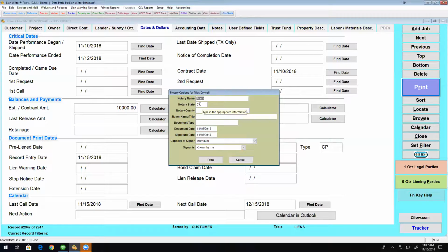It depends if you need a notary on a mechanics lien on the county in the state of California. There are counties, if you send along a notarized release, they will send you a nasty note back with your notary on it, and it will say that, okay, we filed it, but we don't need a notary. You send it to another county, and they'll send you your mechanics lien back saying, oh, you didn't send the notary, you're in trouble. Find out if the county you're filing in is requiring a notary.